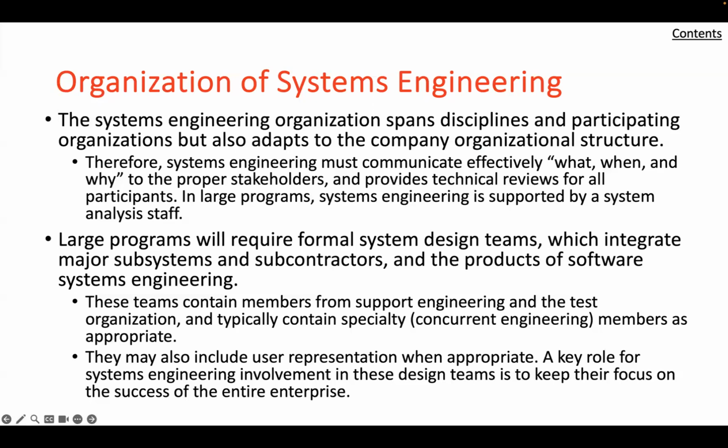Three, subcontractors and other key participants at remote sites must be integrated into the project communication framework. At the management level, this is the task of the system project manager, but at the engineering level, it is the responsibility of the project systems engineering staff. It is essential that the same two coordinating functions described above be provided for the entire contractor team. For this purpose, conventional formal contractual mechanisms never suffice and sometimes hinder. Accordingly, special effort should be made to integrate the team members effectively into the total system development effort.